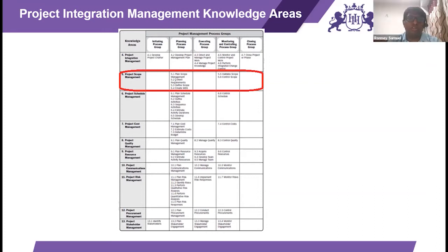So there would be something known as a scope baseline. You will have a baseline scope for that particular moment. As the requirements are changing, you will always change the baseline and put a new baseline. So with respect to the given baseline, if your requirement is matching it, it is included. If it is not matching, it is not included. If it is not included, there can be only two possibilities: either we have to work on it or we have to consider it a part of a scope change. Now this involves a discussion with the customer. Does that answer your question?